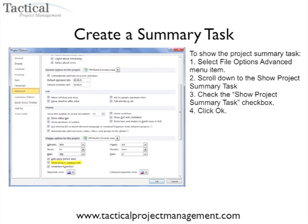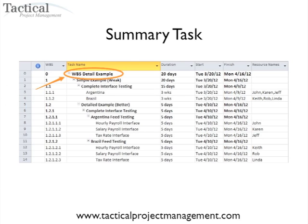The second lesson learned is learning to create a summary task. A summary task will take the name of your project schedule and create a high-level summary that rolls up all the project data into one. In this example, at task zero in the work breakdown structure, we've created a summary task called the WBS Detail example. It goes through all your subtasks and automatically calculates the roll-up — in this case 20 days in duration — and if you look at cost, it'll summarize that for you as well.